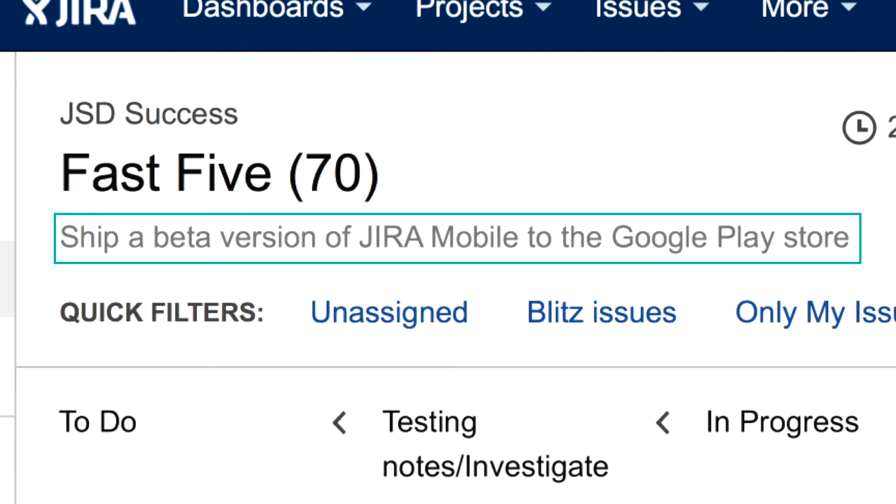Also use that sprint goal to limit scope from outsiders of the team, right? So say, look, this is our sprint goal. When they come to you and try to ask you for more stuff, more scope, say, this is what we're going to ship, this is what we agreed on. We can talk about the next stuff next sprint, but it doesn't align with our sprint goal. Or you might want to take it on because it will totally help you achieve your goal even sooner. So give the team a bit of autonomy that way to make their decisions and help them move fast, get some stuff done, show progress.